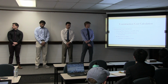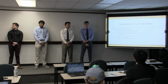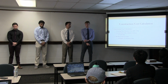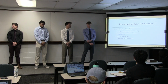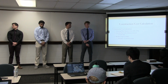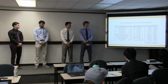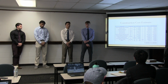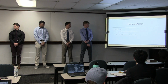And the final element today is a preliminary, or 10% contingency, construction cost calculation. The EPA's water treatment cost estimator was used for this, so the consumer price index was used to determine an inflation rate, and RS Means was used to determine a city cost index of South Bend relative to the rest of the United States to help estimate the construction cost. So with that, the construction cost was determined to be just shy of $9 million for the environmental portion.